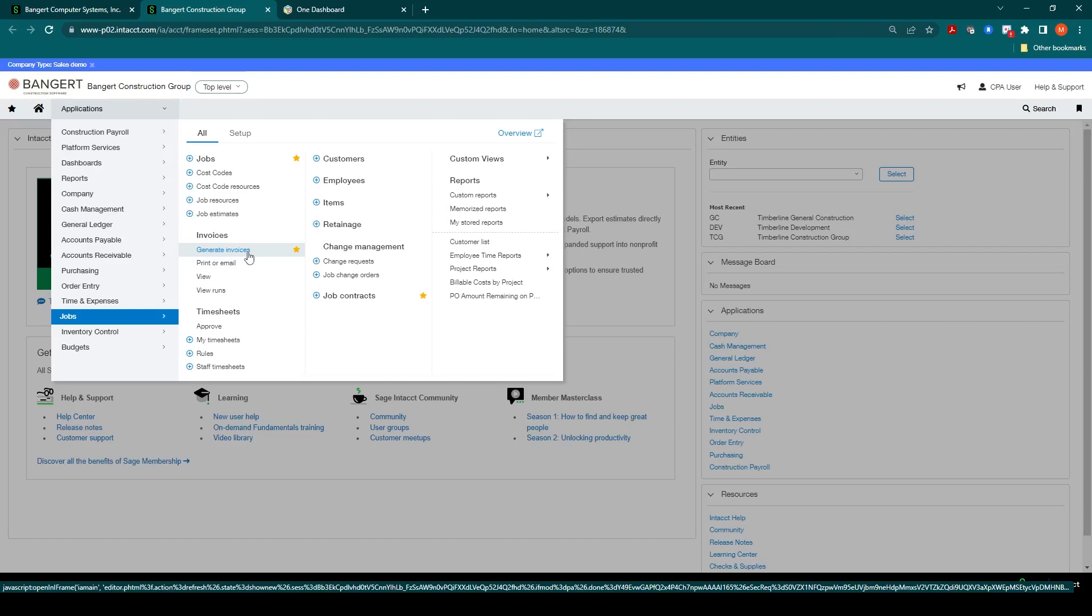Both these contract amounts and billing amounts will post to the projects and general ledger and be included on reporting, for example, the WIP report for projects.